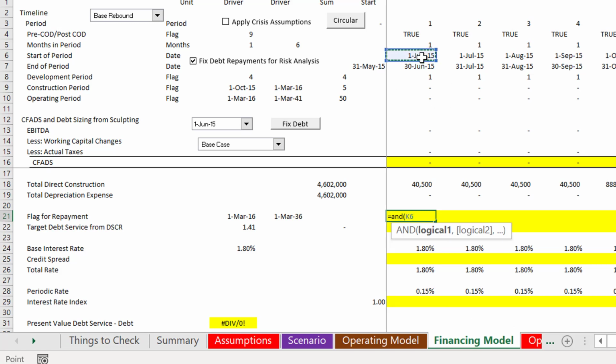Now, when I do these things, it drives me kind of crazy, and you're going to get mad at me, and you're not going to change. I know you're not going to change, but I think you should always decide on whether you're going to use the beginning or ending. I always will use the beginning. And this nonsense of trying to sometimes use the beginning and ending and getting all confused with switches, I swear it will be a lot easier if you don't. And then we're going to put our very standard calculation: the cash flow divided by our DSCR, that's what drives the debt.